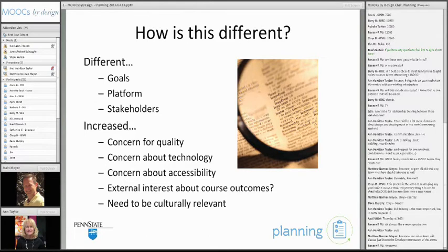So we're still learning a lot, but we just went through our first round of this two-part proposal process, and it went pretty well. We learned a bit. We adjusted timelines. We recognized that for repeat offerings of MOOCs, we weren't thinking ahead enough and hadn't made that a speedy enough review process. So a MOOC that's been offered once and wants to be offered again, we had to speed that one up a little bit, shorten the proposal because this was a known quantity. Things like that had to be adjusted.